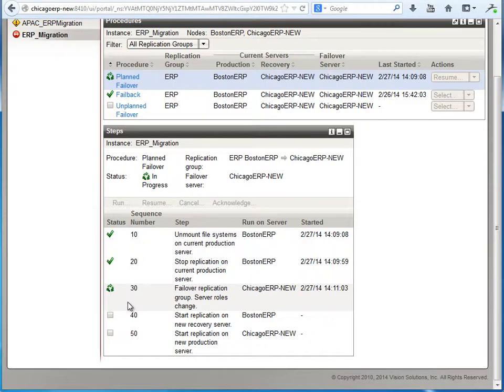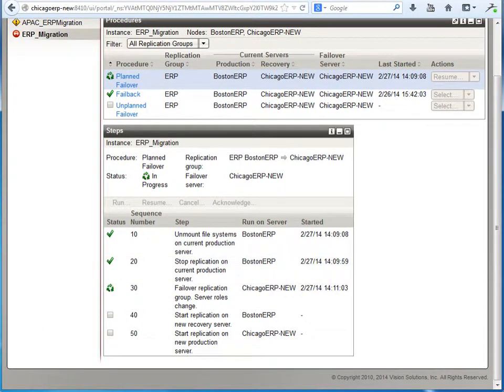After the third step, I'll pause for a second. You may have noticed that the old server's database, application, and storage were stopped as part of the second step. It's not altered in any way during the third step. And why is this important? Because this means that the old production server is there in its pristine condition. If there's any problem with the cutover, you have the option of readily cutting back to it and aborting the migration. This is a very important component for contingency planning.